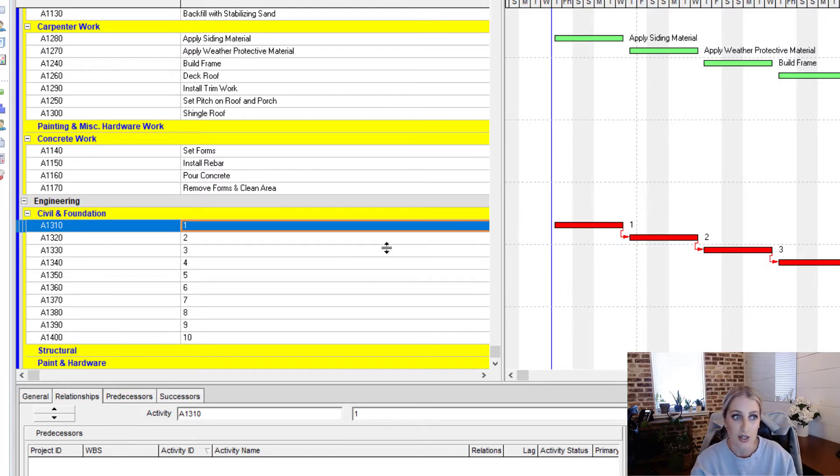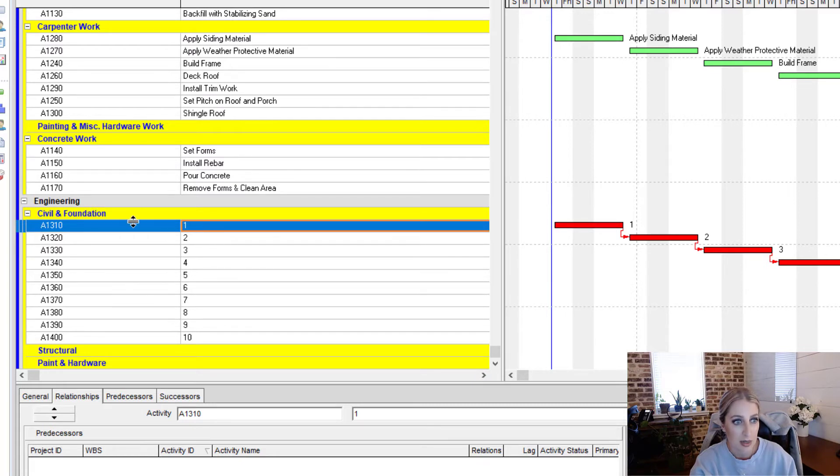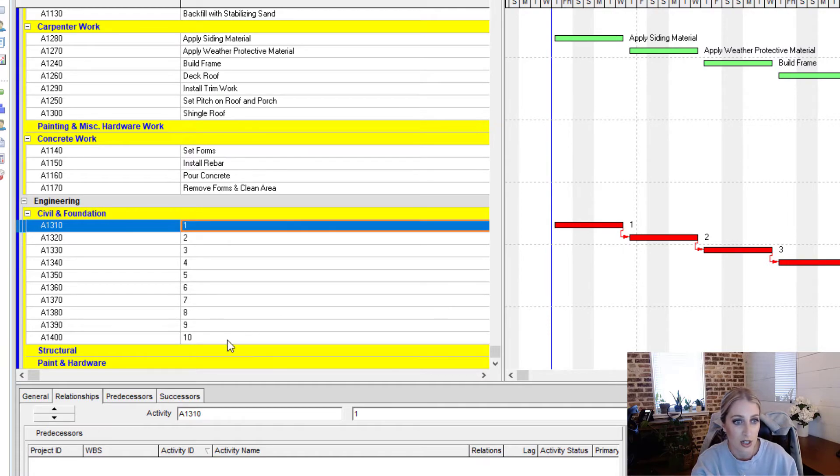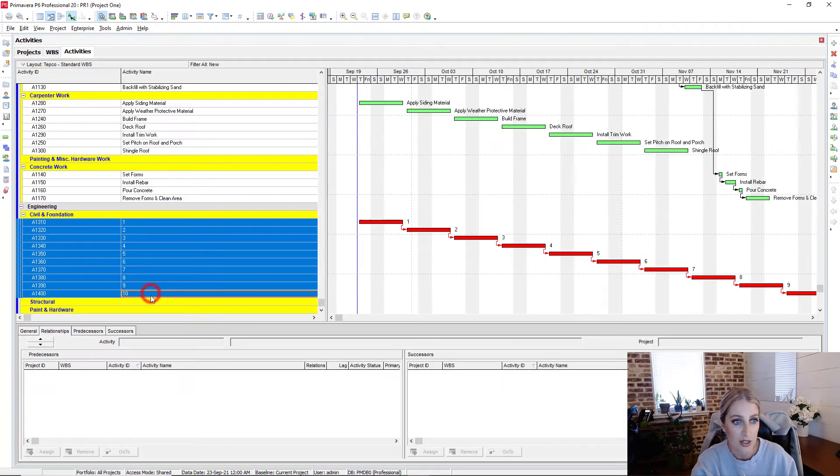So to remove activities more in mass and without having to use that Gantt chart and use the relationship lines that we have in the Gantt chart, what we can do is we can select by selecting that first activity that we have, holding shift on our keyboard, and then selecting the last one.